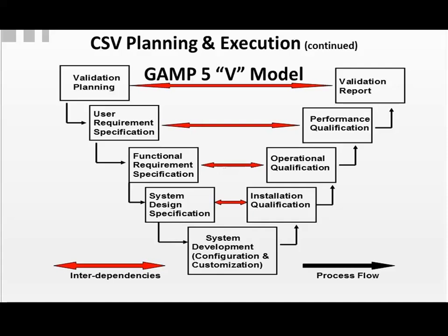And after testing reports are done, you have your validation summary report that sums it all up and says, we did everything we said we would do in the plan, and everything was successful. Or if it wasn't and there was any deviation, it's accounted for and explained.